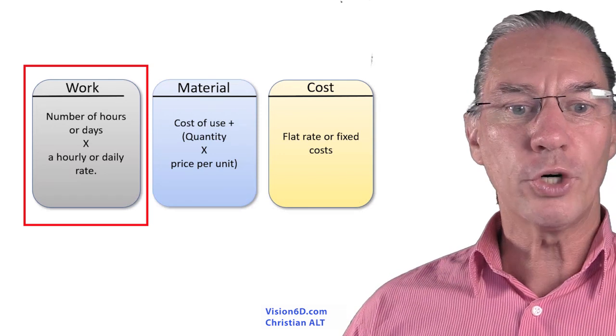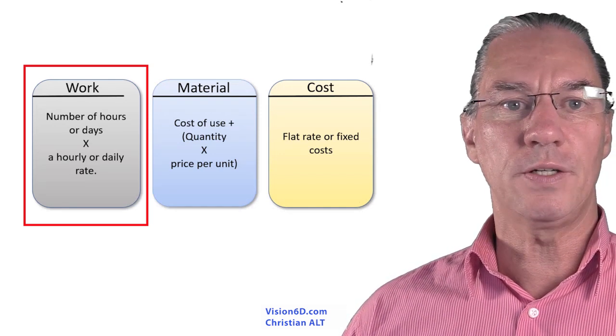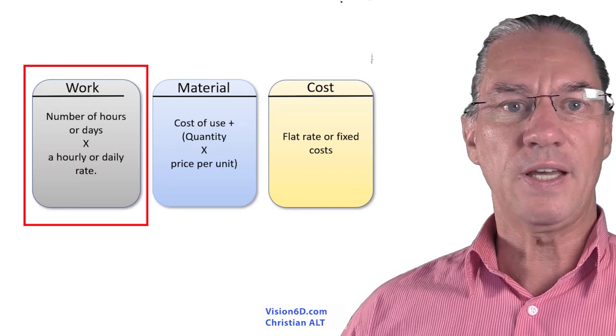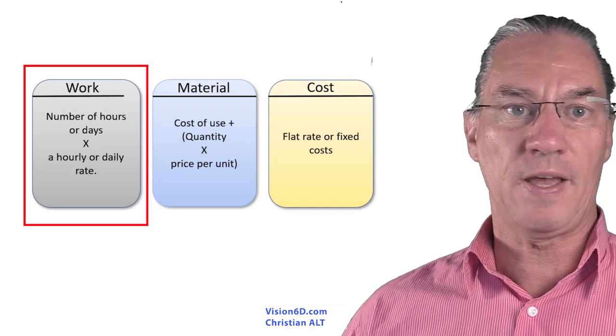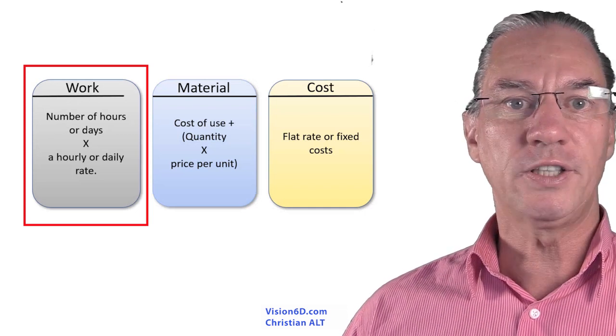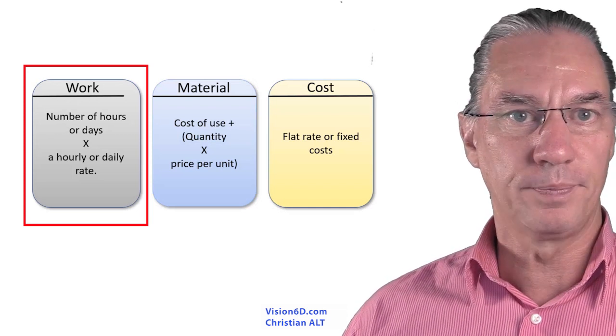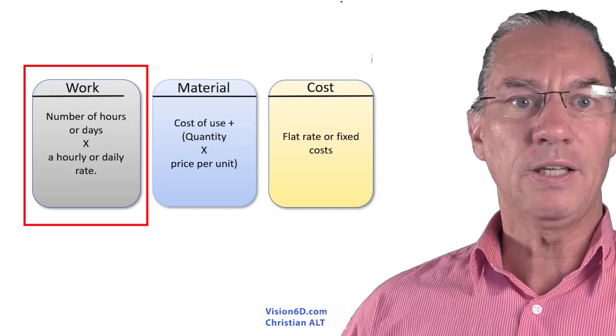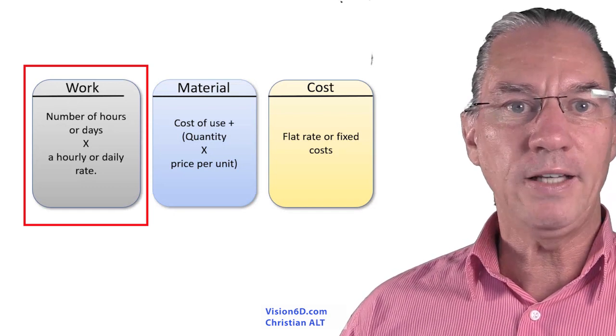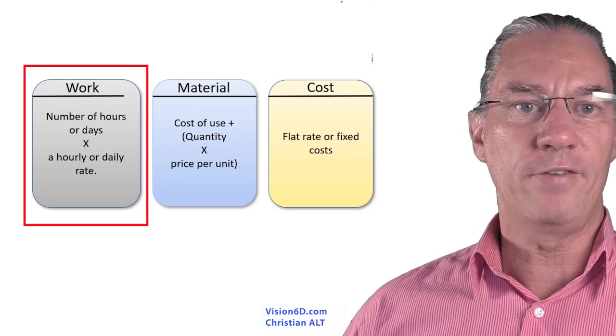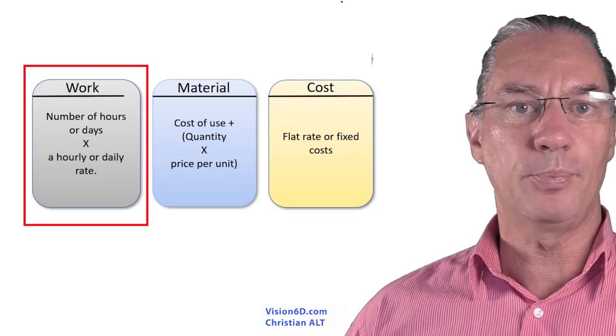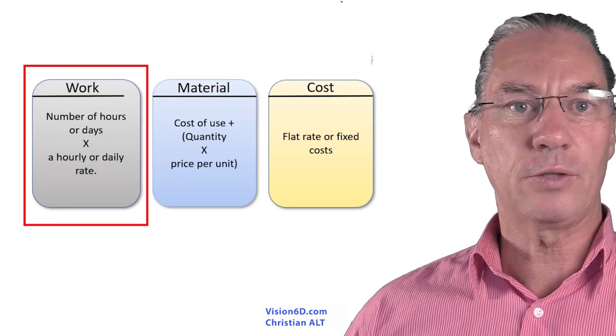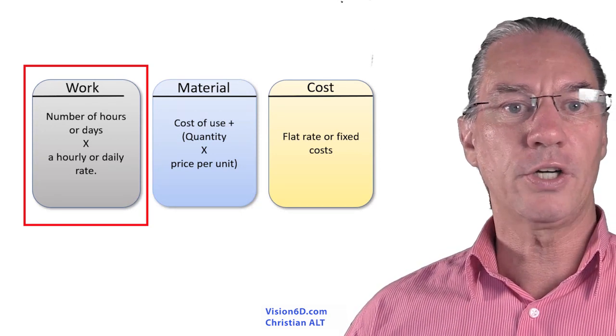The work resource is maybe the easiest to understand because it's a number of hours for a worker multiplied by an hour rate. It can also be a daily rate that you can have for developers or consultants that would come into your company.